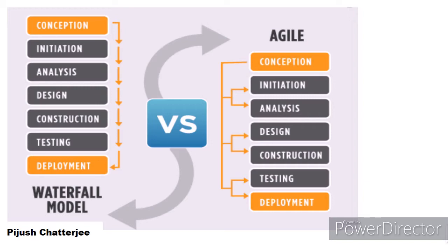In this agile process, what I said, like within two or three months, is even broken down into sprints. In Scrum language specifically, we say that a sprint is generally one month or less, and after that sprint cycle, your product increment should be ready for release. It does not necessarily have to be released, but it should be complete and should be one feature or goal of your overall product. The benefit is that the customer always gets at least one feature to test, so you can get early feedback on the system.